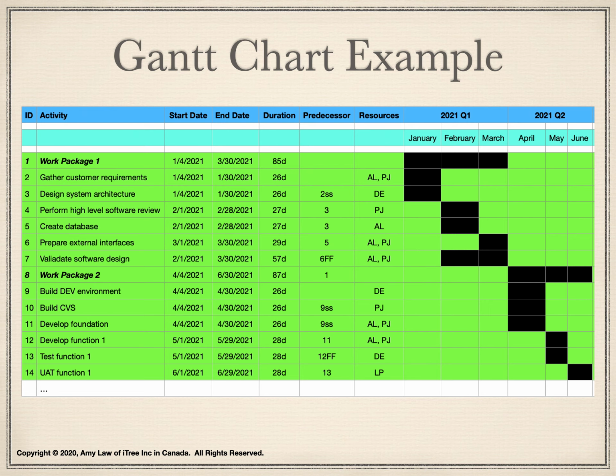The Gantt chart has the resources assigned to do each activity. It has the graphical monthly forecast and quarterly forecast. With the Microsoft Project software, we can change the configuration so that we can show arrows for dependency between activities. If a duration is 0, then the activity becomes a milestone and it is illustrated as a diamond on the graph.